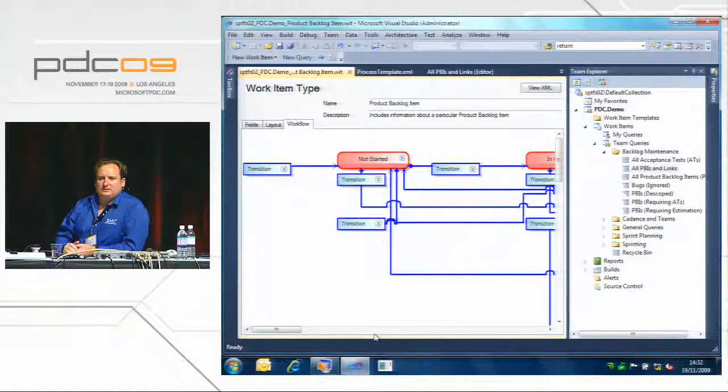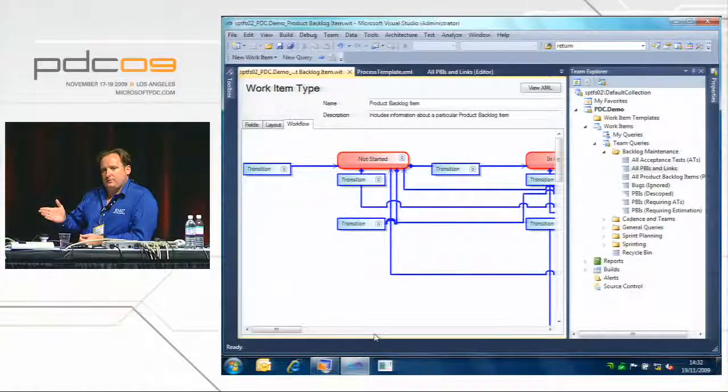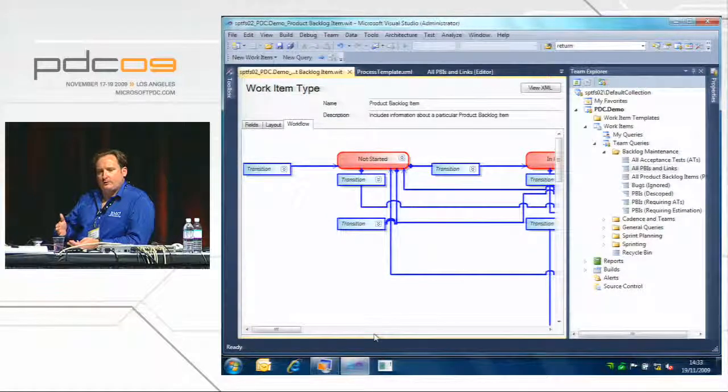In this release, within Visual Studio that the team explores, can you do drag and drop to prioritize your backlog? Not really. Well, you sort of can in terms of iteration paths. You've got to remember, the way the templates force you into these things is you have sequential numbers. And if you put it into Excel, then you can drag and drop to actually do the numbers. But what's always going to happen is the iteration path is always going to override that priority.